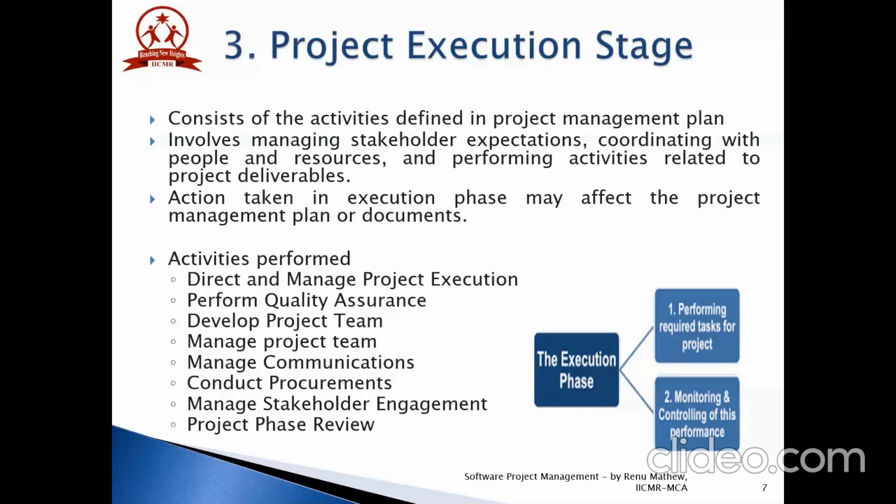In this stage, there are 2 main roles involved: the buyer and the seller. During the procurement process, the activities involved are issue the bid package to potential sellers, hold bidder conferences, evaluate potential seller proposals, and select the winning seller proposals.